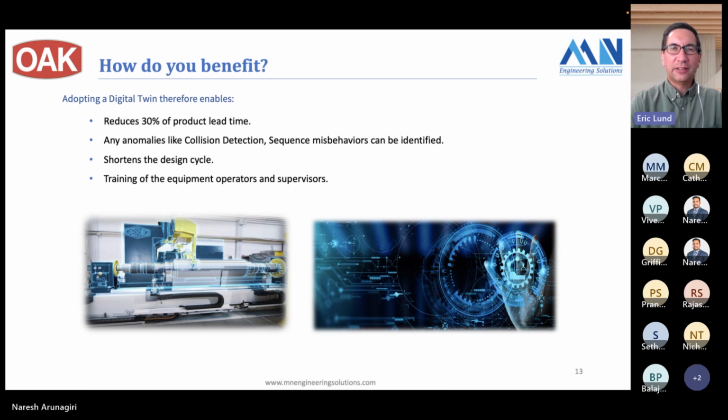And Narisha talked a little bit about that too, is how we could send those models back and forth with them and test them thoroughly in a virtual environment before we had to wait for parts to be machined. And that saved us money, of course, because we didn't have to remake some parts, but it also saved us time because you don't have to wait for that manufacturing process to occur, which is also part of shortening the design cycle.